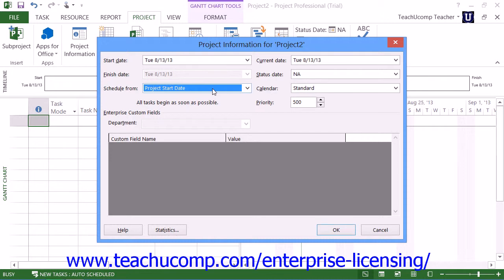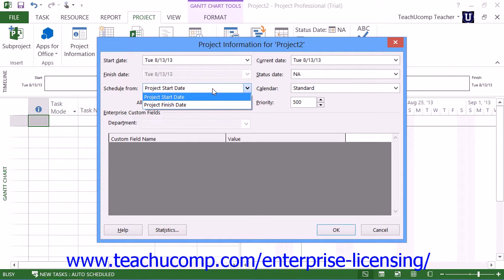Note that you can set a Finish Date and then schedule tasks from the Finish Date back up to the current date if desired, but that's typically a bit more complicated. This is typically only useful when you have a standard project that contains standard, easily measured and controlled tasks that you know must end by a specified date and simply wish to know when the project should begin.